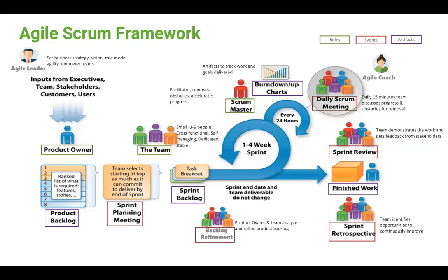the team will just pick user stories without refining it. They start to work on it. They get in the middle and they now realize, this user story, we have dependency on that. Oh, and they can't finish the story. Does this make sense?